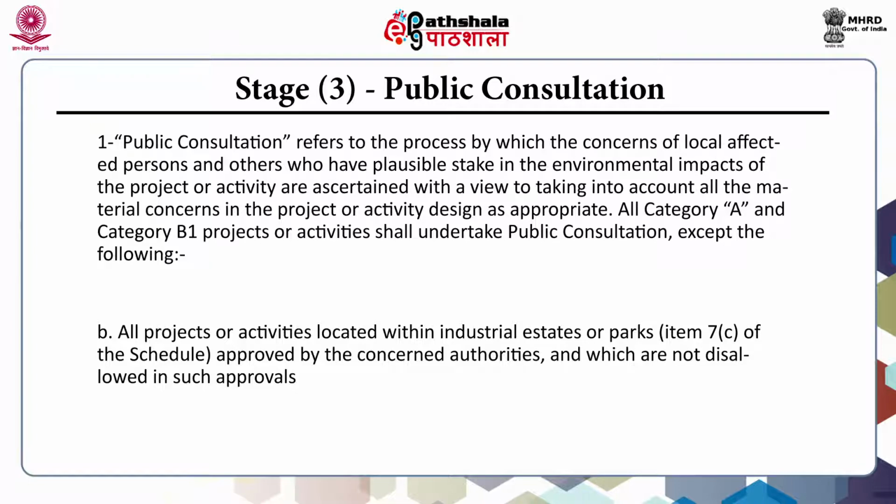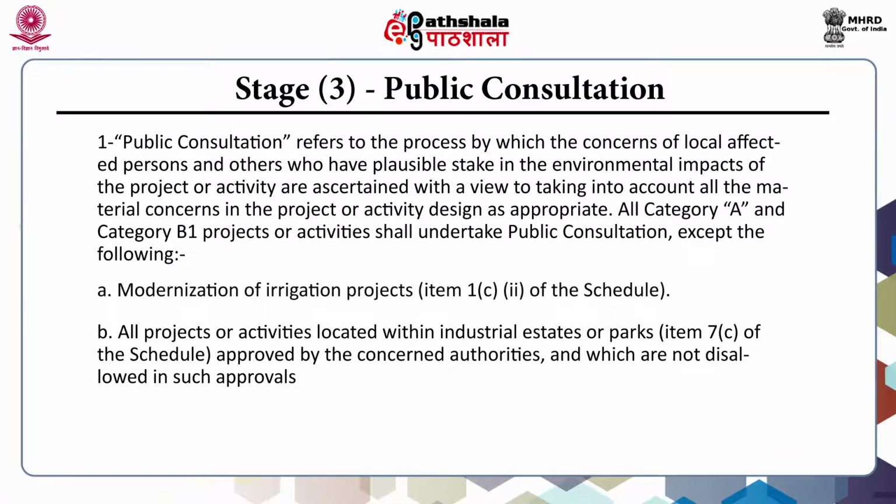All category A and category B1 projects or activities shall undertake public consultation, except number 1, modernization of irrigation projects, which comes under item 1(c)(2) of the schedule.